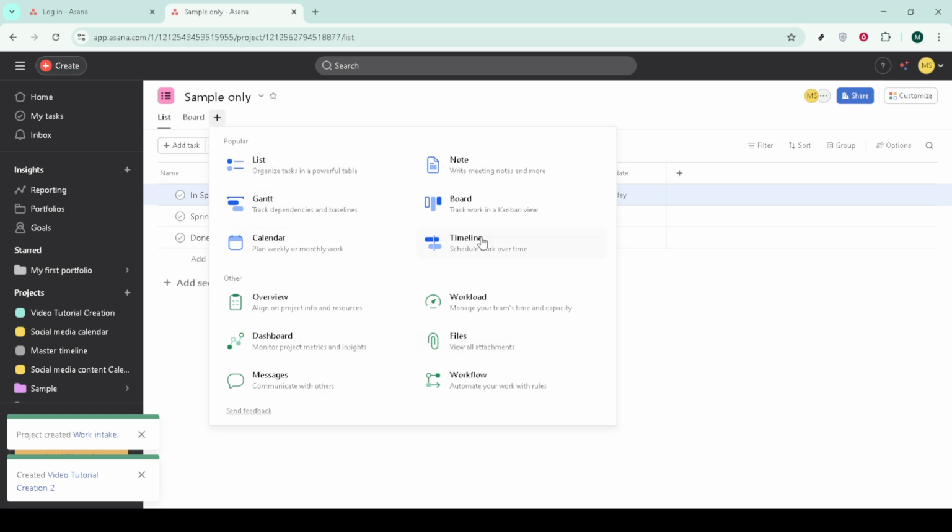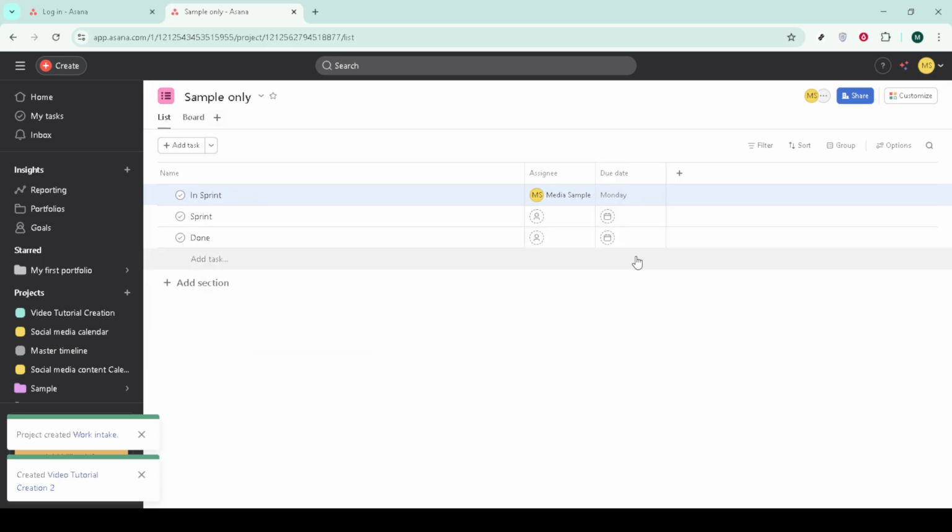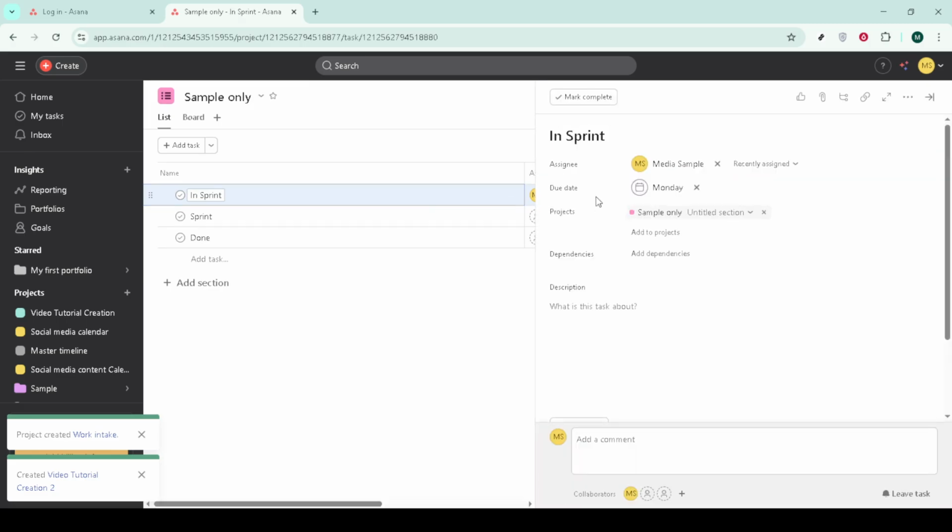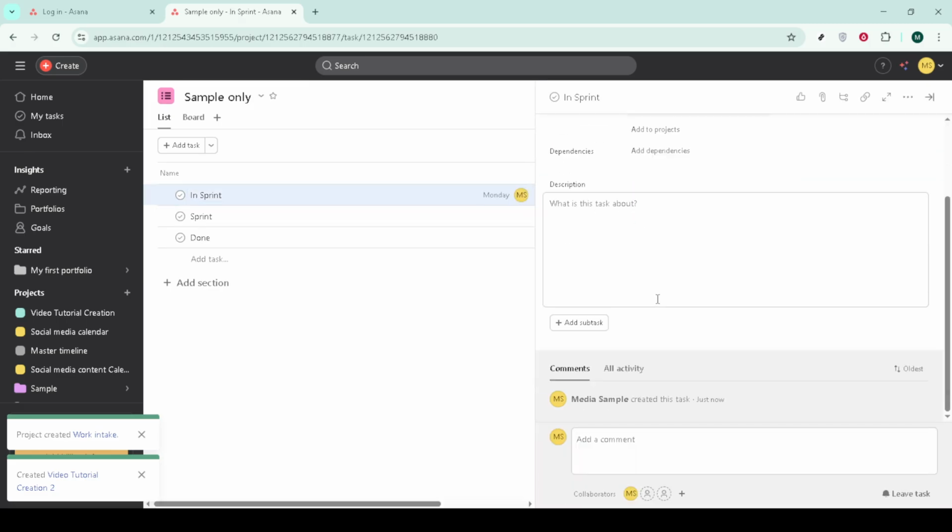Refine and prioritize the backlog regularly. In refinement sessions, improve descriptions, add acceptance criteria, estimate story points, and flag dependencies. Then sort by priority and points and drag the most valuable, ready items into to sprint. The goal is a clean top of backlog that could be pulled into a sprint with minimal friction.